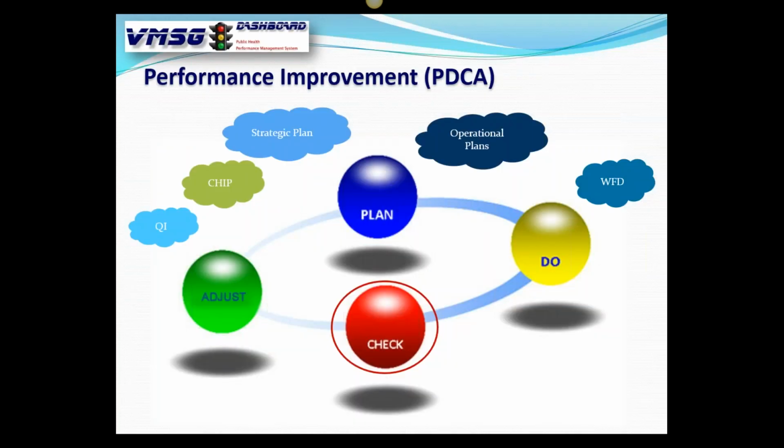Okay, so what we did is just checked our plan against our actuals here using that chart, and now we're going to go into the adjust phase. In the adjust phase, if there's a requirement to make an adjustment to the plan or the resources, we're going to do it here. In this case, we're running right along exactly what we thought, so we're probably not going to make an adjustment. And then we're going to continue through the cycle again at whatever time we decide.